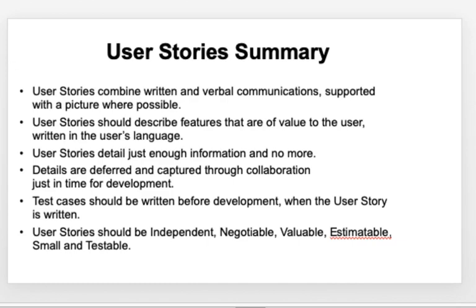And test cases should be written before development when the user story is written. Kindly note, that is the job of a tester in the group. And all user stories need to satisfy what is called INVEST, right? Independent, negotiable, valuable, estimatable, small, and testable.